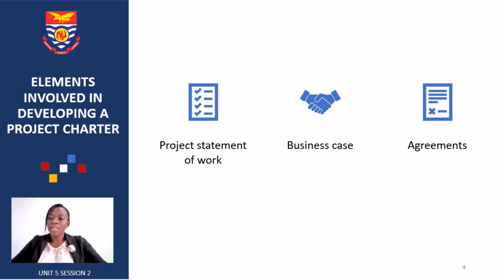Then we also have business cases, and the purpose of the business case is to document the justifications for undertaking a project, usually based on the estimated cost of development and implementation against the risk and anticipated business benefit and savings to be gained. There are also agreements, which look at contracts, memorandum of understanding, and letters of agreement, which emphasize the initial intentions of the project. These are legal documents, so you may need experts to help you out as well.